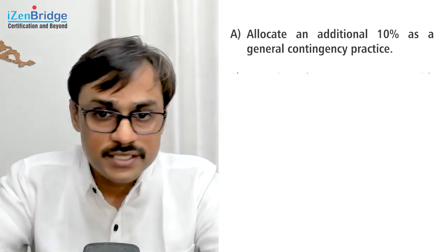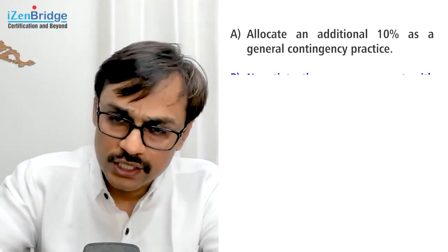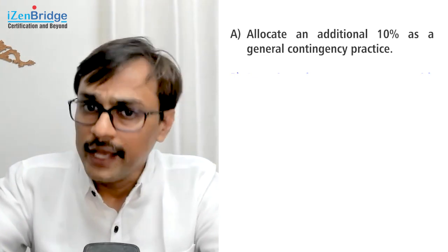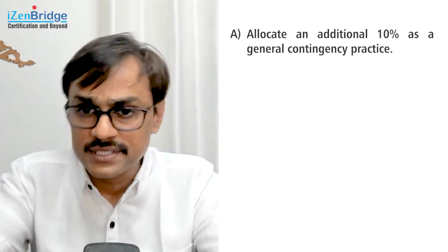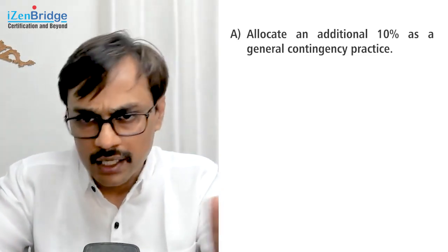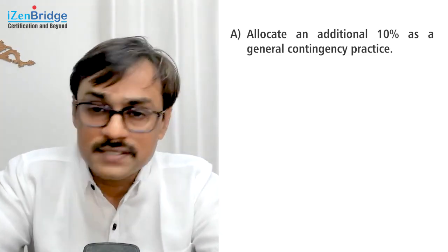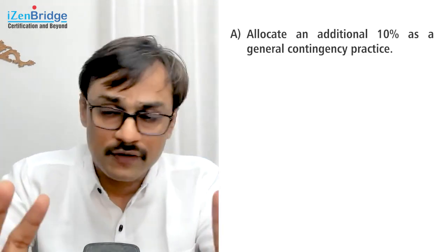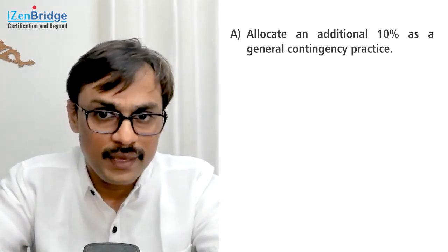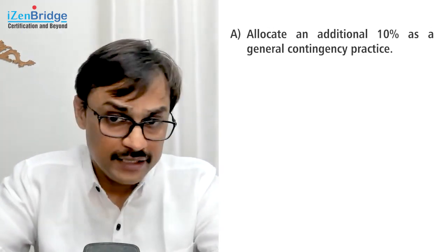Now, in many organizations, such practices are used. You have a project cost, and based on your historical information, you have some percentage number given by your organization, and you add 10% contingency, 20% contingency, and you say, this is going to be my project budget or my project timelines. So maybe a part of your organization practice, but not necessarily we can consider it as a good practice in our project management, because just putting a number on top of your estimate may not be a good estimation. So let's see if we can get a better option.